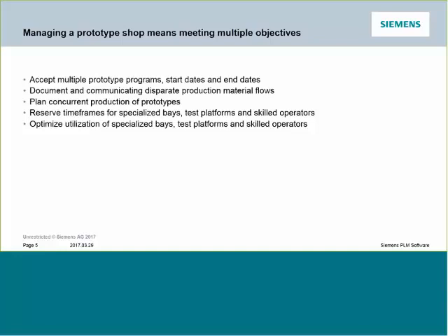Similarly, you've got to optimize the utilization of specialized days, test platforms, and skilled operators. One possibility to avoid collision and contention is often to space things out, whether it's in time, whether it's in shifts or calendar days, but that might lead to a suboptimal utilization of those specialized days, test platforms, and skilled operators, and sooner or later someone's going to notice.